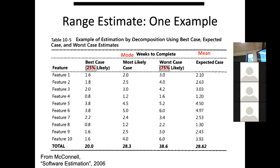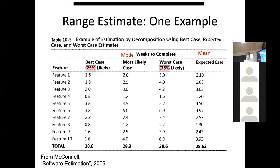In a range estimate, you give a best case and a worst case — the optimistic case and the pessimistic case. You think them through, communicate them to stakeholders, and they're clear you're not promising a particular value. They can see which deliverable is more certain and which is really uncertain. You might also have a most likely case. This is a decomposition-based technique: do it for each feature, in a range format, communicating best and worst cases. It is a safer method.